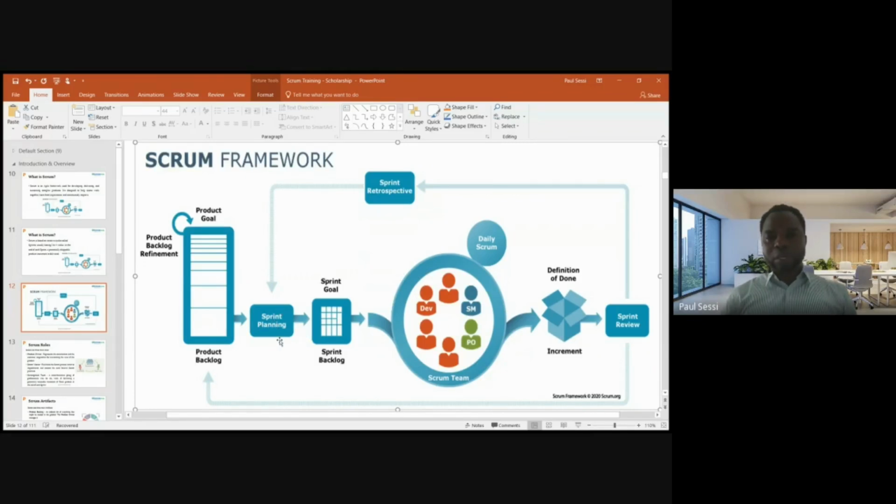So at this point, everybody sits together to plan. Now, this planning is time-boxed for 4 to 8 hours, right? By the time you finish planning, let's say we are finished planning, what we concluded after we broke down all our tasks, right? What we concluded was that based on our velocity and our capacity as a team, we can do 2 of those things in a sprint cycle, right?